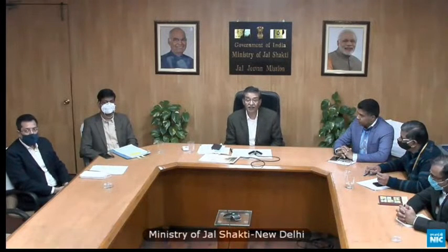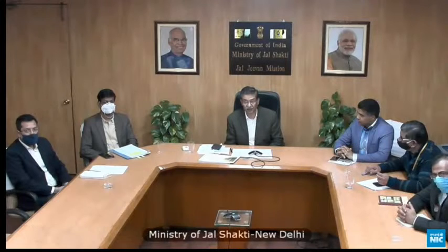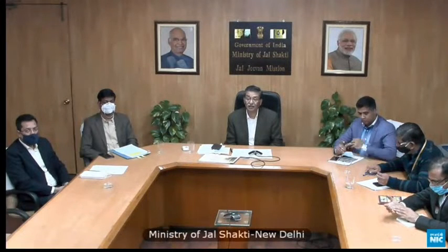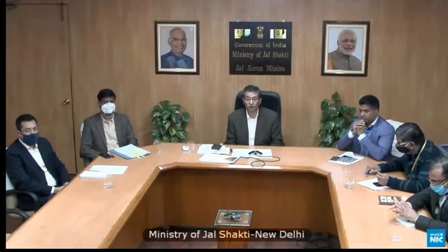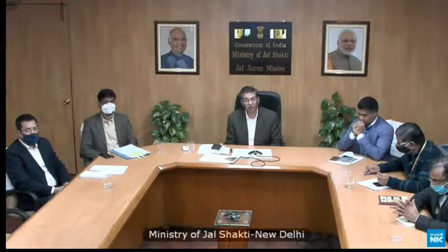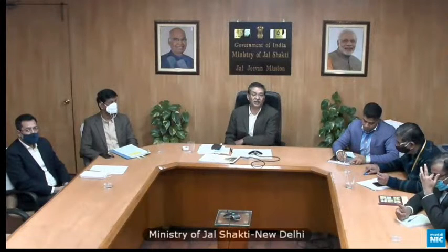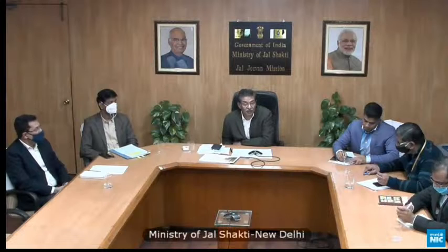Since last 25th December, last year when guidelines were released, till date, we have been able to provide 2.82 crore households with tap water connection. As you know, if we go by our yearly target, it comes to around 3.2 crore. So we are short of roughly 38 lakhs.